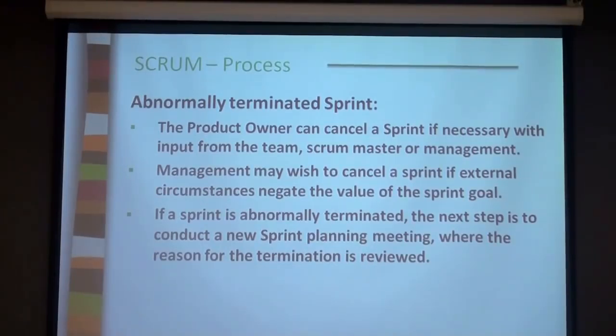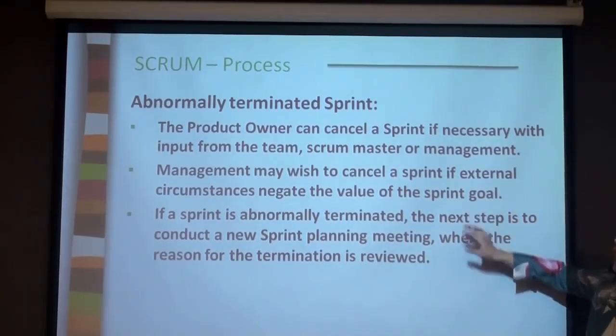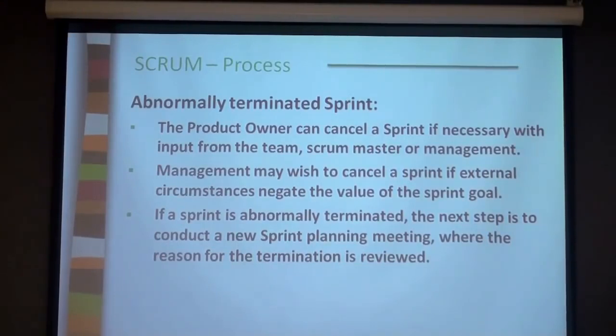And management may wish to cancel a sprint if external circumstances negate the value of the sprint goal. There may be major shift in the company management and they decide not to develop this line of product any longer for whatever reason, right? They decided to explore a different market, and then they may just cancel this project. And as I mentioned, if the sprint is abnormally terminated, the next step is to conduct a new sprint planning meeting and move forward. And of course, you need to understand the reasons for the termination of the previous sprint.